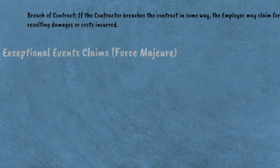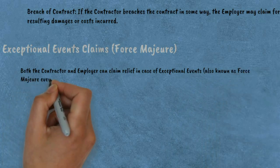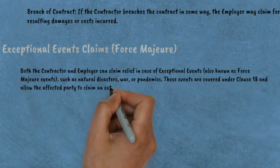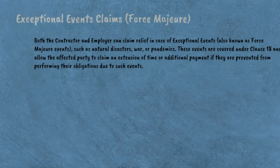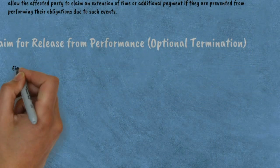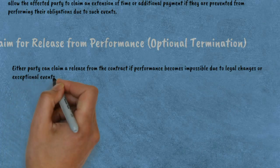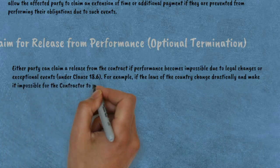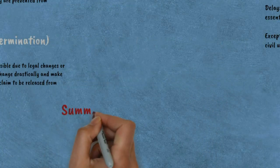Fifth, exceptional events claims — force majeure. Both the contractor and employer can claim relief in case of exceptional events, also known as force majeure events, such as natural disasters, war, or pandemics. These events are covered under Clause 18 and allow the affected party to claim an extension of time or additional payment if they are prevented from performing their obligations. Additionally, either party can claim a release from the contract if performance becomes impossible due to legal changes or exceptional events under Clause 18.6 — for example, if the laws of the country change drastically and make it impossible for the contractor to perform its obligations.